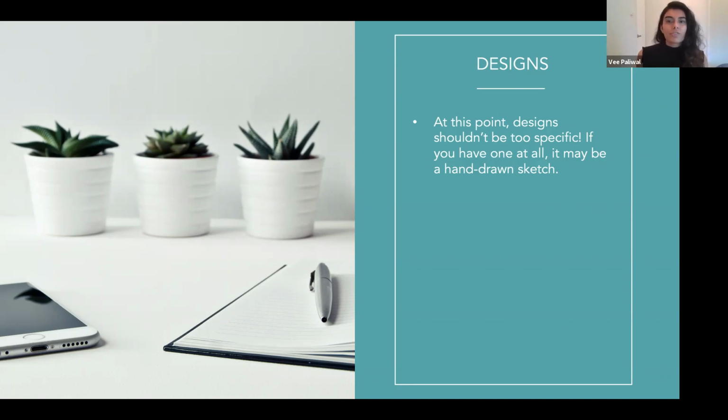And then the other thing, just from a tactical perspective, I notice a lot is people get hung up on designs if they're in a spec, and people will start giving a lot of feedback on like, why is it like this? Why is it like that? And really it's like, we're still figuring that out. So I like to link out to designs, because they're going to change. A lot of people have opinions and feedback on it. And that way, you know, there's one source of truth, like this Figma file or the Sketch file is a source of truth for the design, and that may change. But my engineers aren't getting confused by going into my spec and seeing a design that's different from whatever has changed. So that really helps.